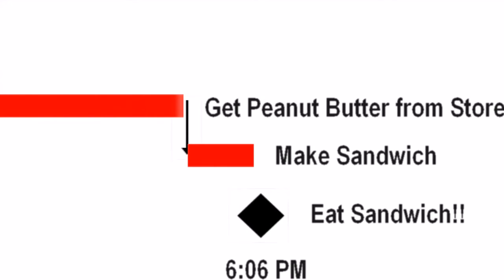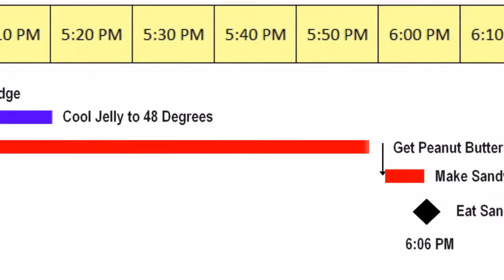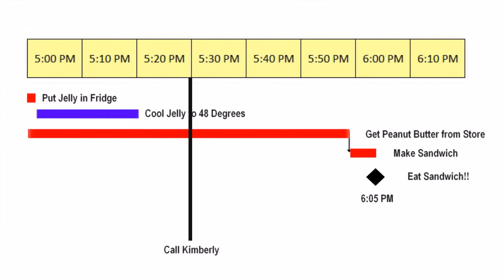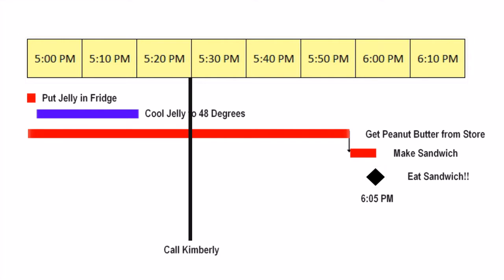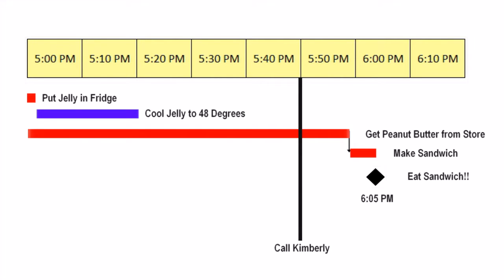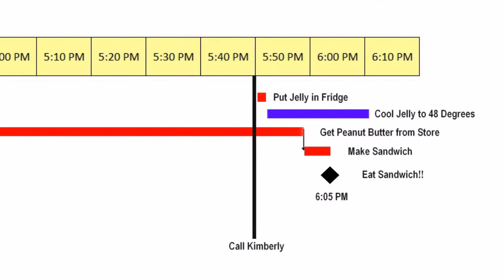Now, say my sister Kimberly is at the house and she said she could put the jelly in the fridge for me so I wouldn't have to worry about it. Well now, I could leave the house immediately and shave off a whole minute so I could potentially eat my sandwich at 6:05. I get out on the road and I call her at 5:30 to remind her to put my jelly in the refrigerator, but she doesn't answer. I keep calling, but she's not picking up. Finally, at 5:50, as I'm on my way home, I get a hold of her and she said she's just putting the jelly in the fridge. Well, this is just great. Now, I'll be home at 6 o'clock, but the jelly won't be cool until 6:10 because it takes 20 minutes to cool and it's 5:50 right now.